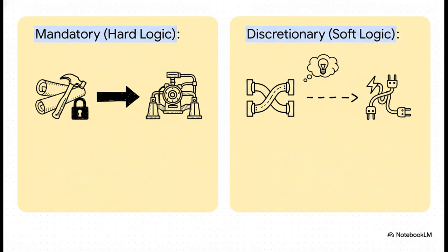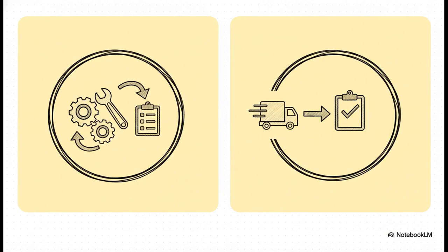You know, your team might decide it's better to paint all the rooms before installing carpet. Could you do it the other way? Sure, but it's probably not a good idea. And the other way we slice this is by control. Is the dependency internal, something your team can manage? Or is it external, something you're just stuck waiting for?